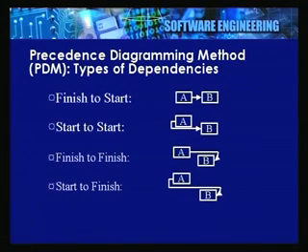Okay. The third type of relationship that we have is finish to finish type of a relationship. In finish to finish relationship, just like the start to start relationship, the two activities are required to finish at the same instance. Okay. So, rolling out of a new software and completing the user training probably need to occur at the same time, or in case you are releasing a particular software at multiple locations, then that release must coincide at the same particular time.